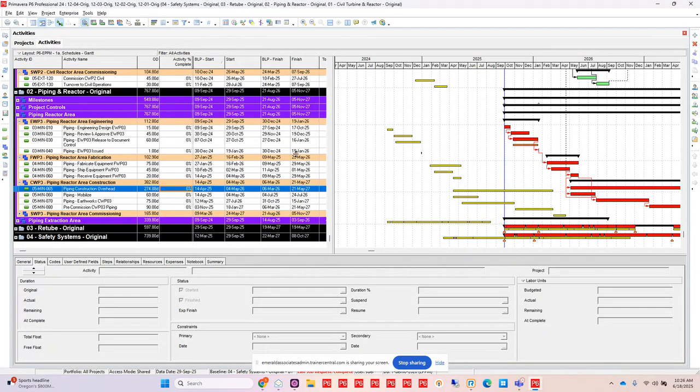So you may have different contractors that are doing piping or electrical, for example. So that's why it might make sense to split up the different areas of your project into different projects, because those contractors would be providing different schedules, and you want to maintain those schedules that they're providing for you, but you don't want to lose the inter-project dependencies that those projects have. So being able to set up that logic between them is really a great thing to be able to maintain.